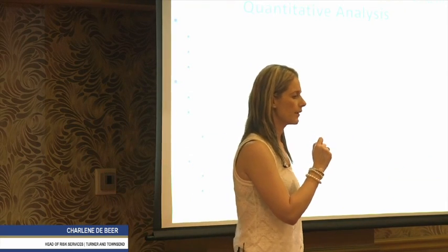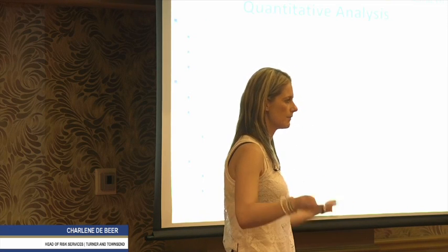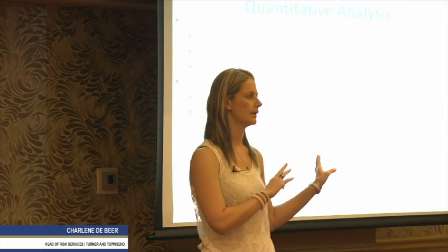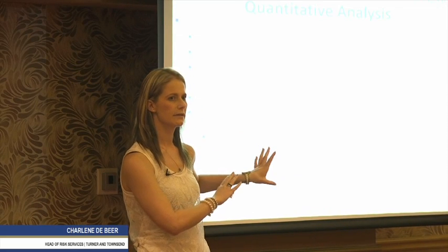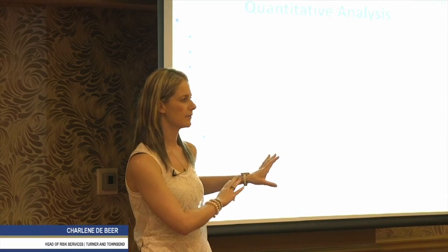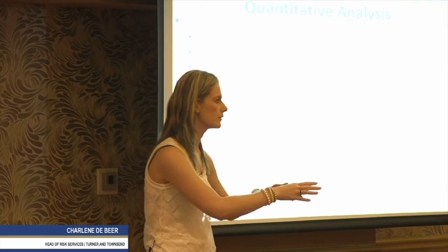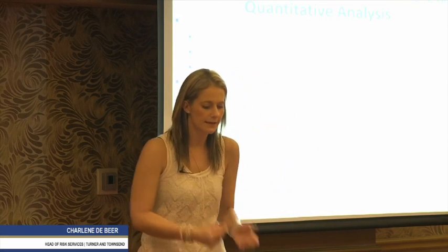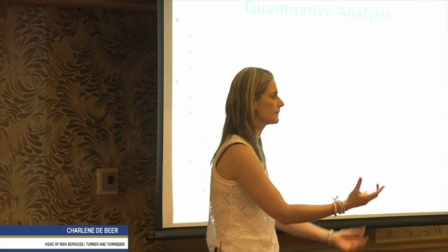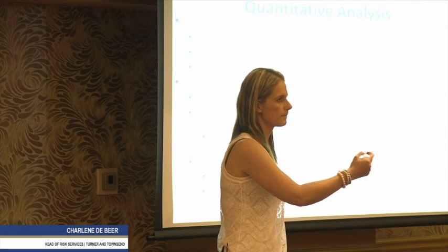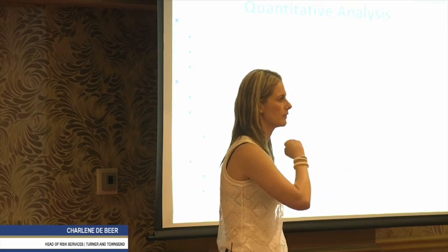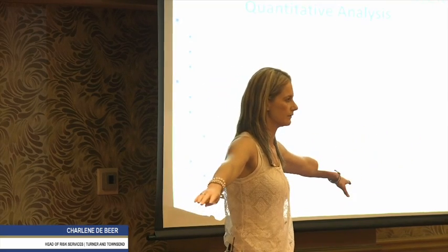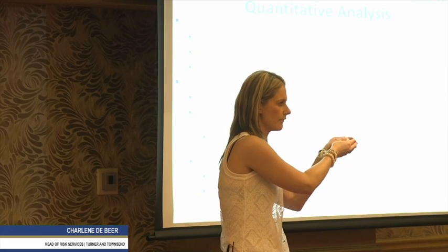And I'll say to you, so how much do we spend a month on, let's say, civils, for example? And let's say it's 4 million. So weekly, we spend R1 million, okay? So if we would delay civils, for every week we delay them, it could cost us R1 million, right or wrong? Depends on who's to blame now, but let's just say civils will stand for a week. We physically spend R1 million a week for them to work, right? Now, if there's downtime, and they are still entitled to a claim, for example, it will cost us R1 million for every week that civils is delayed. However, the whole civil site won't be delayed, right? It will just be a portion thereof.